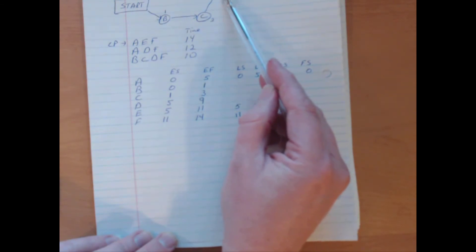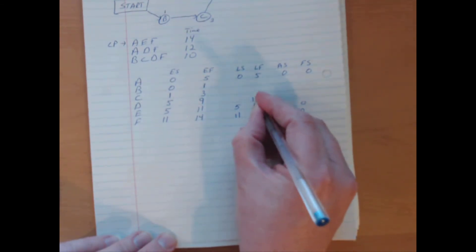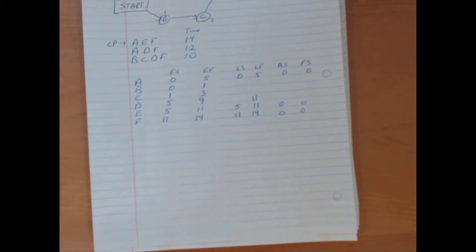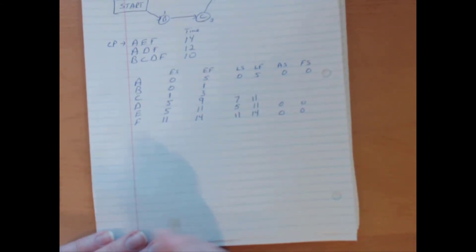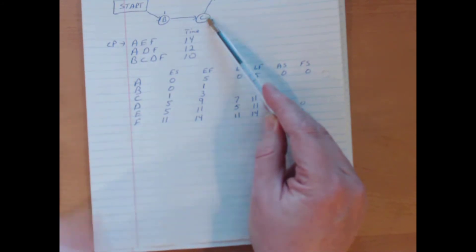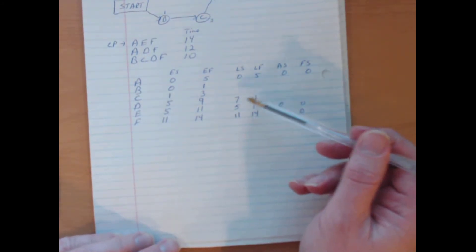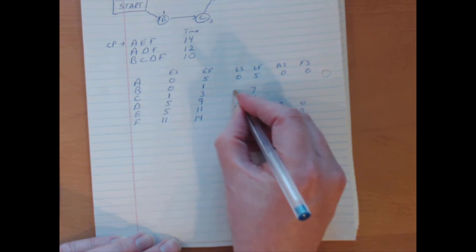So activity D now. What's the latest finish for activity D? Well activity D is a predecessor activity to activity F. So F cannot begin later than period 11, which means that D cannot finish any later than period 11. Otherwise, it will impact when period F can begin and then delay the whole project. Working backwards, D takes 4 periods or 4 months. 11 minus 4 is 7. Same kind of thinking with C. We have to start to think of for C, what's the latest finish time for C? Well, D depends on C, or C is a predecessor activity to D. And D can't start, or can't finish any later than period 7. So C must be done by period 7. Otherwise, there's trouble. Minus the 2. And C's latest start is period 5.